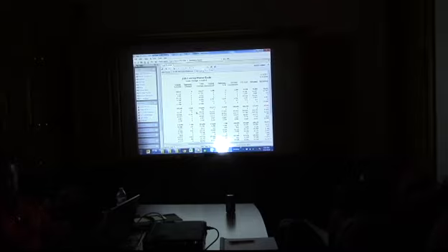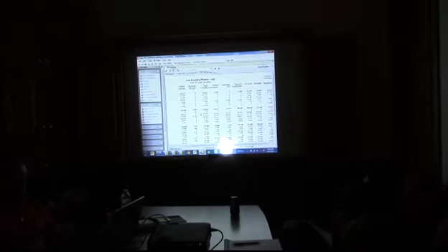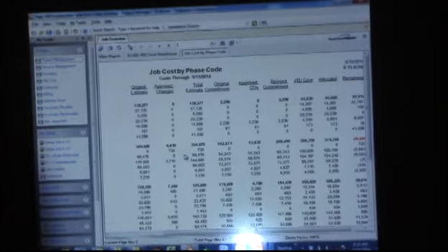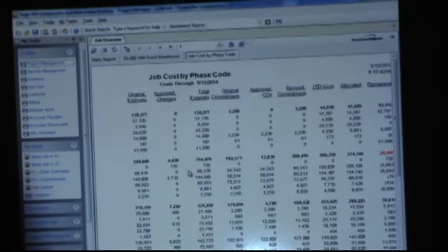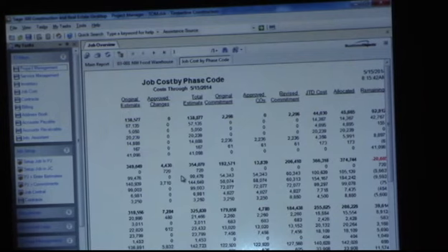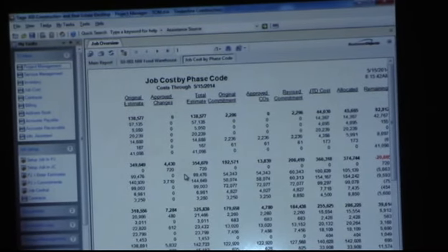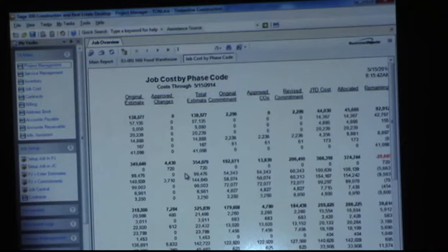So that's an important piece of doing this all well, because some companies, when they approve change orders, document the extra revenue, but they don't document the extra cost. So on your cost report, every single line item's over because the scope has changed and the work you're doing no longer matches your original estimate. So what you really want to do is, as part of each change, document the changes to your estimated costs as well as the changes to your revenue. That way you can see which line items are truly over budget or under budget to manage your costs.